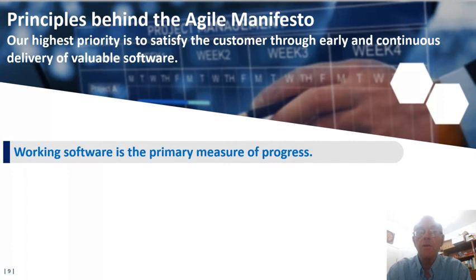Agile methodologies advocate for delivering software in small increments, known as iterations or sprints. Each increment should include working software showcasing the incremental value being added. The completion of working software provides a quantifiable measure of progress. Team and stakeholders can gauge how much of the project scope has been successfully completed.